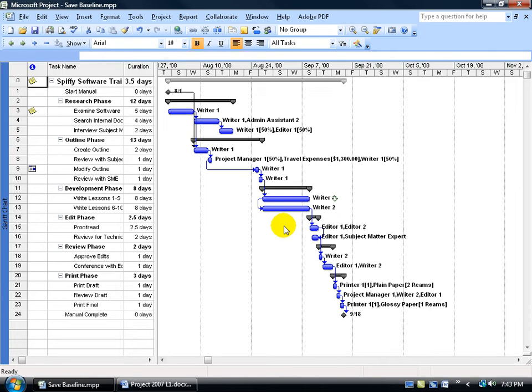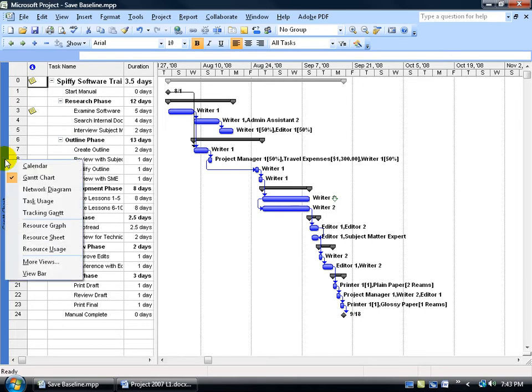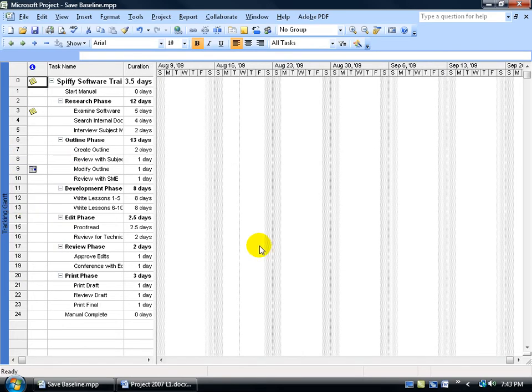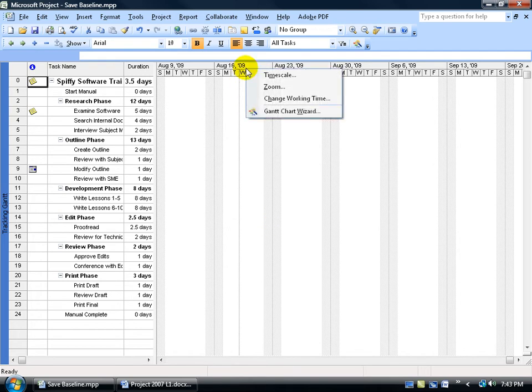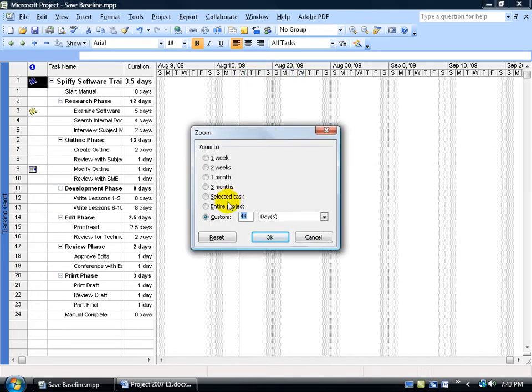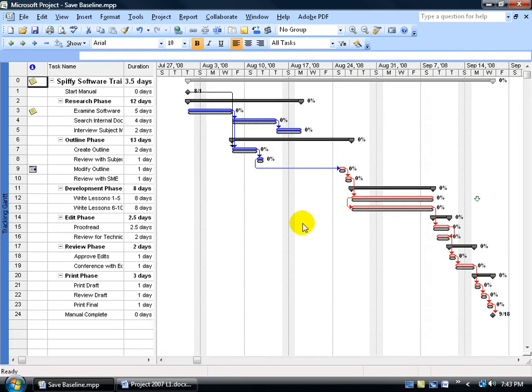Now, where do I go to see this baseline? Well, one view you can go to is the Tracking Gantt. Come over here and right-click on the Collapse View Bar, go down and select Tracking Gantt. Of course, if you don't see the chart over here, you can right-click on the timeline and go down to Zoom and say you want to see the entire project. Click OK, and there we go.